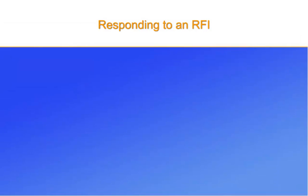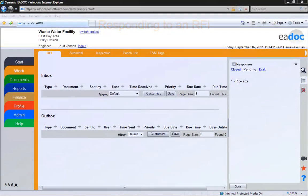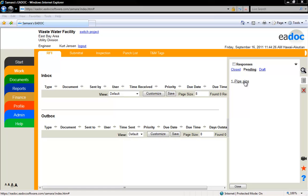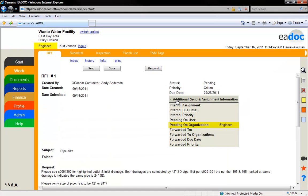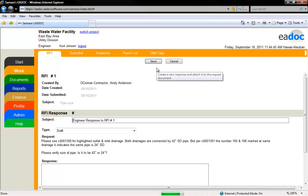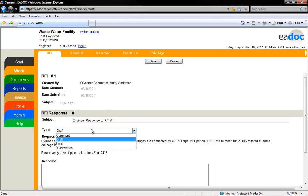In this segment, we will address RFI responses. Select the RFI that you are going to be responding to. You can see that this RFI is currently pending on the engineer. You create an RFI response by clicking the Respond button. A new window will open where you can create your response. Select the type of response: Comment, Draft, and Final are all the same. Supplemental will put a flag on the RFI, notifying users that there is a supplemental response.